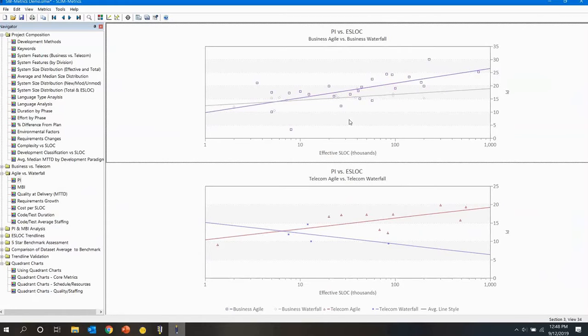I think the second way is in Slim's production equation model itself. Modeling that nonlinear trade-off between time and effort will show you things like doubling your team size is not going to come anywhere close to cutting the schedule in half. I was working with the customer yesterday, and it was almost shocking to see the number of people it would take to bring a 6-month release in by 2 months. Cutting 2 months off of a 6-month project is asking a lot, and it was a huge number of people. And so that kind of prediction is in the model.